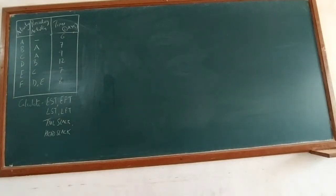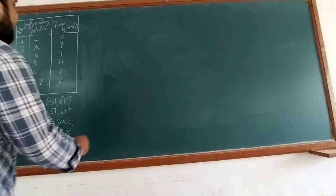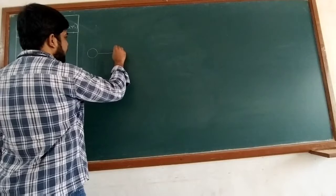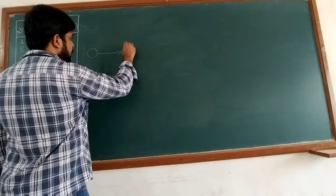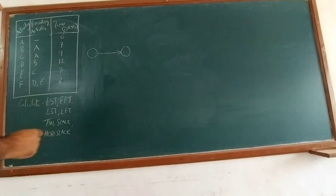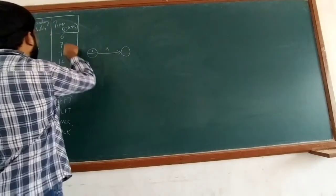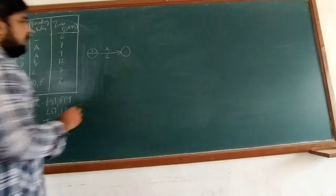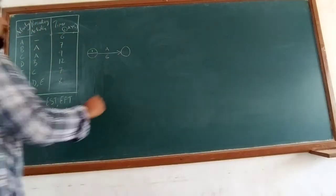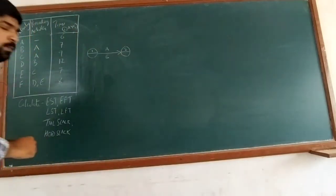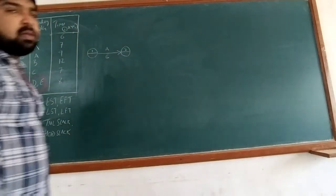The first activity, A, doesn't have any preceding activity, so we start with it. We will name the starting node as 1. The name of the activity is A and it requires 6 days to complete. The ending node we number as 2.